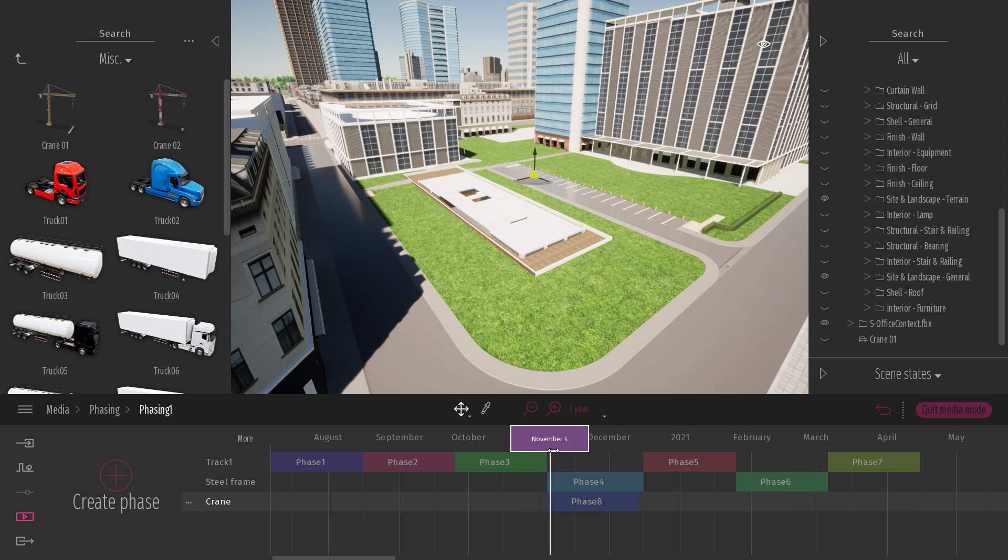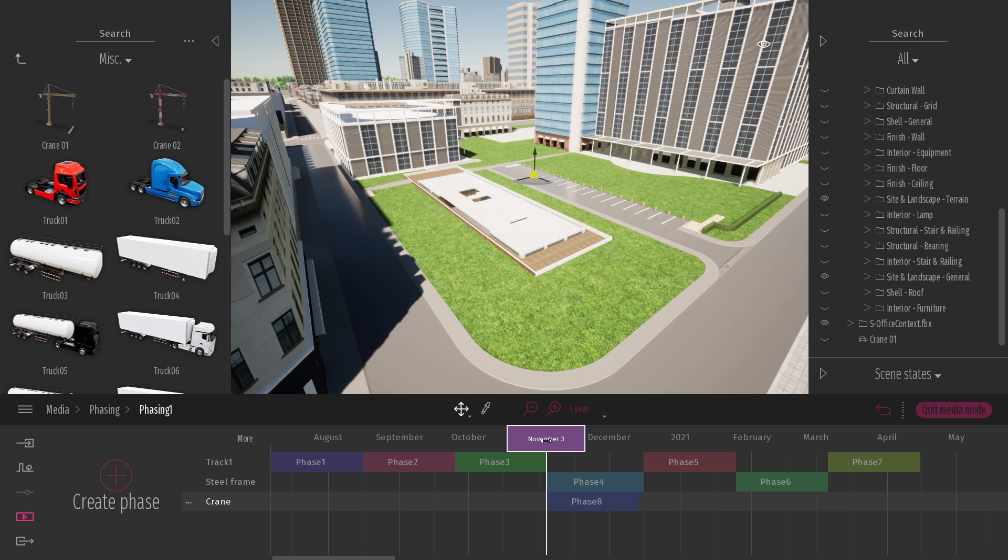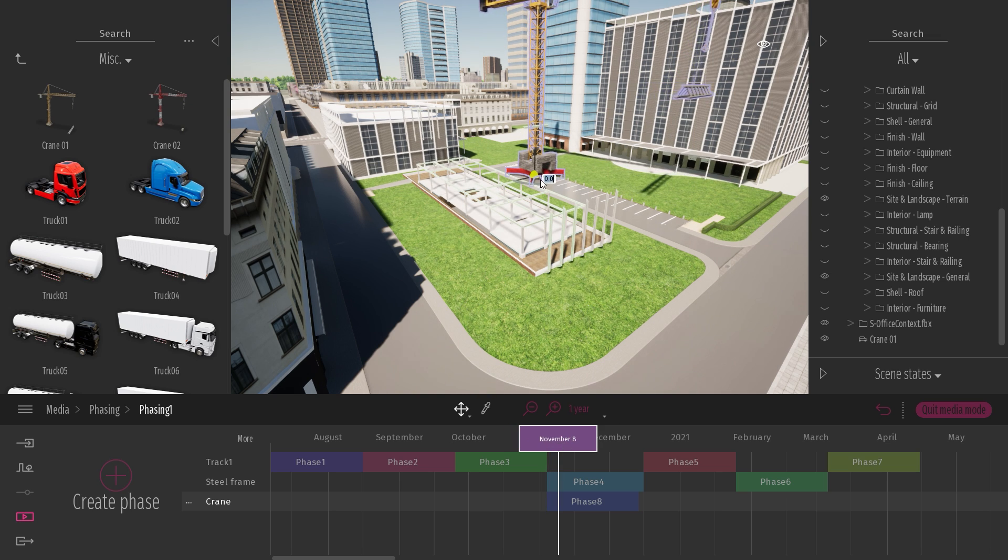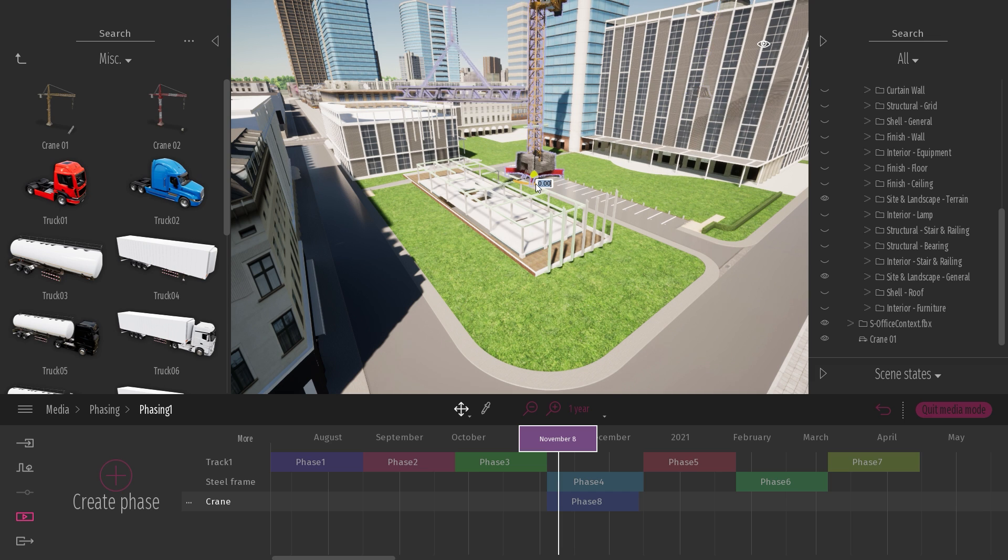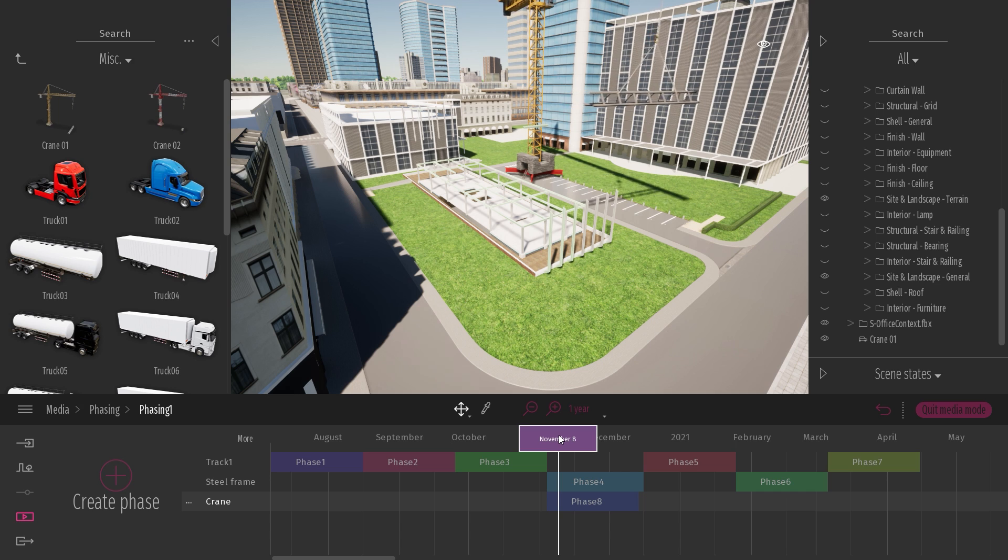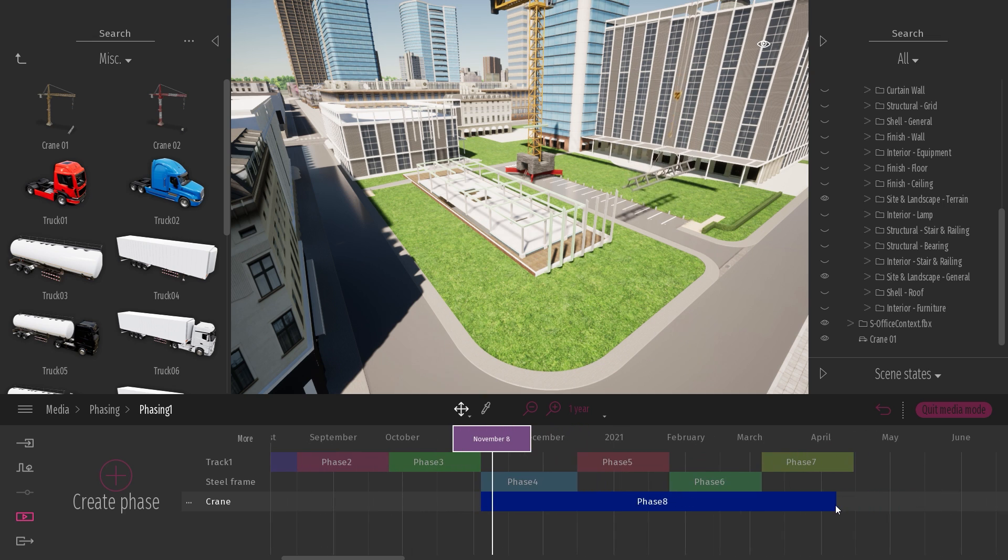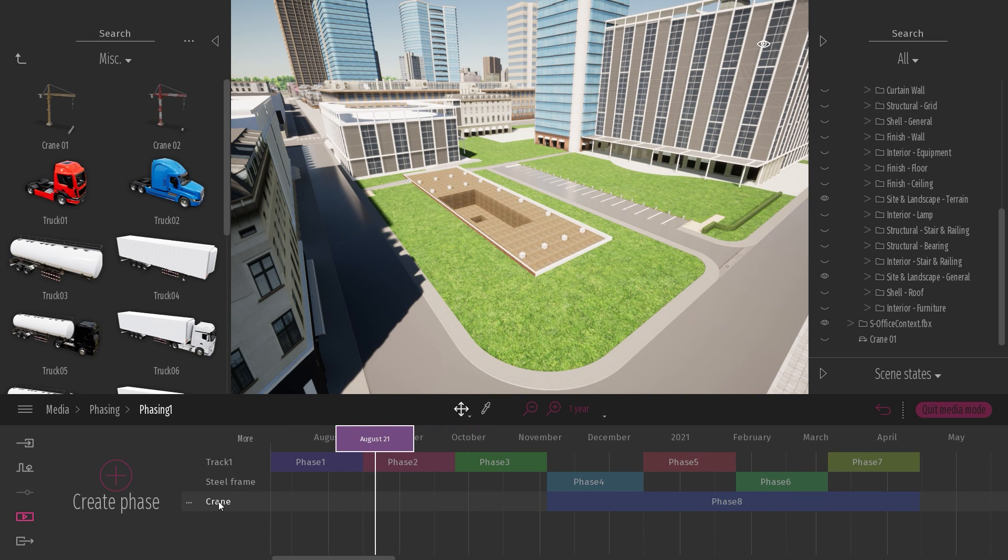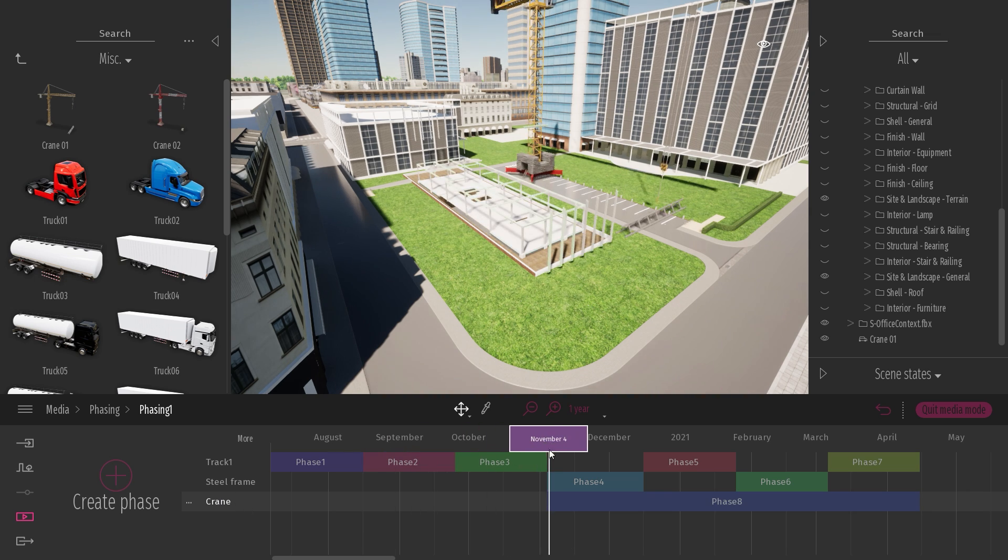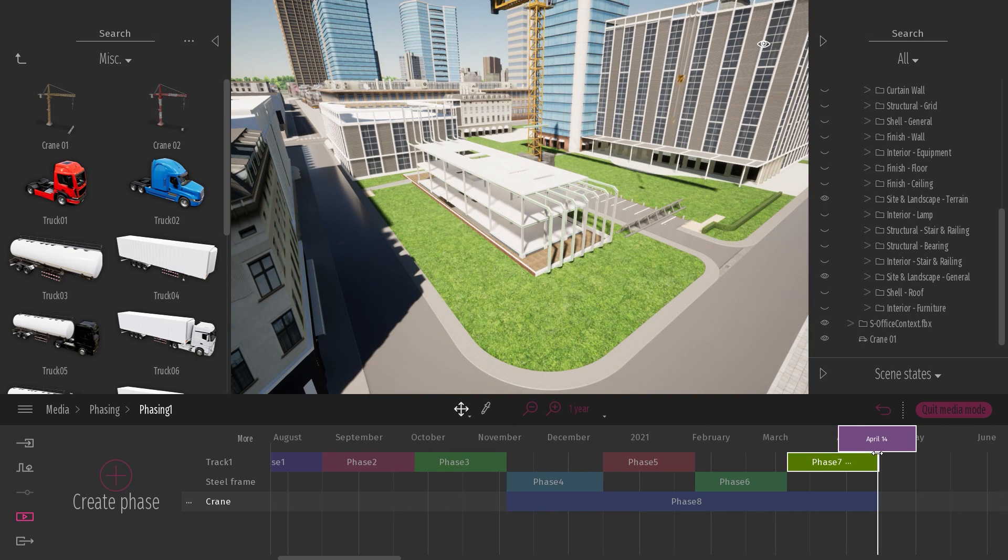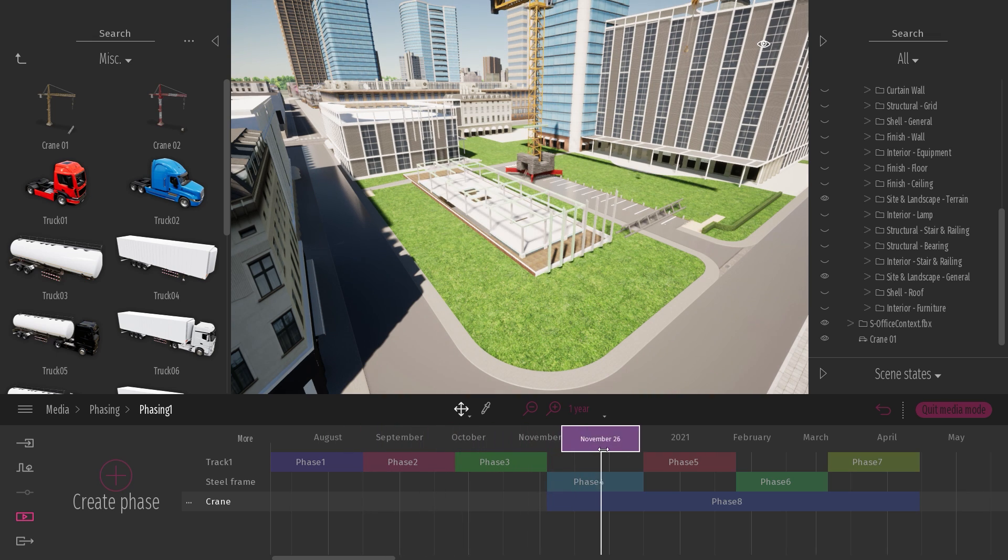And if I move over my project using the timeline, you can see that when I come over after November 3rd, my steel frames start to appear alongside my crane. Next thing I want to do is I know that this crane will be present during multiple phases of my project. So I'll just extend the crane over multiple phases like that. So now I know when I will be looking at my construction steps, my construction phases, I will know that my crane will be present from the start of November until the end of April. So you can use the phasing tool like that.